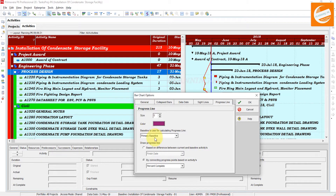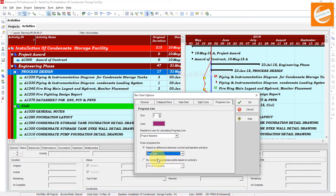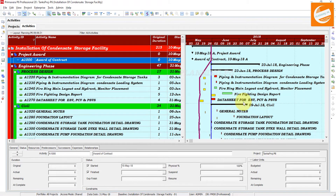There are two options here: primary baseline and project baseline. If you select the project baseline, you have to select either the finish date or start date. First we will check the start date option and click OK. Now you can see the progress line behavior — it is behind from the schedule.